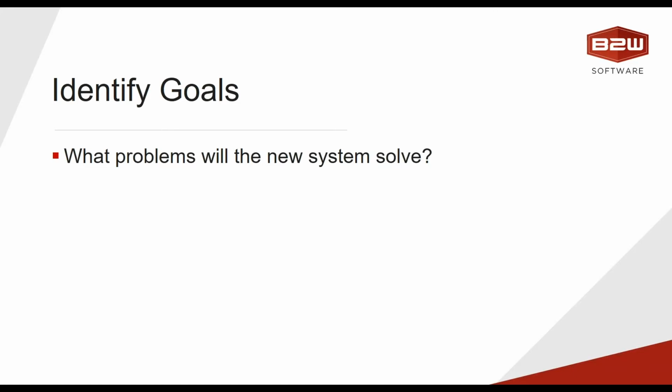If you're at a point in your systems where you really only know if you made or lost money at the picture level of the job, but you don't know how the individual items or the individual activities went, then you probably don't need a 1,000 cost code system to have more information than you had today. Your goal should then be being able to differentiate between, okay, well, how did the paving go versus how did the grading go? That would be a good start, as opposed to knowing the difference all the way down through.